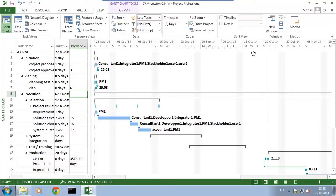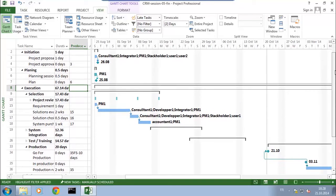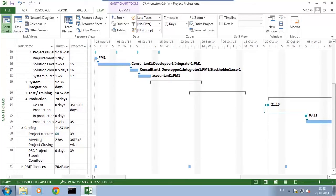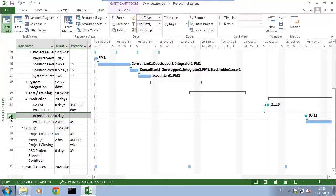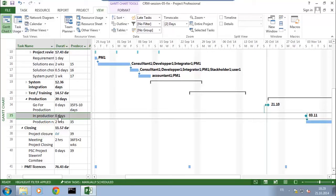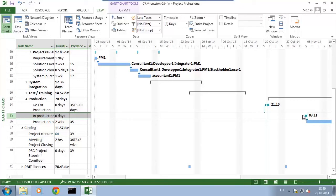I'll jump down in this project. It's an IT project by which we'll install certain elements, and at one point I'll put the system in production. I already have a task called 'in production.' It's not a real task because it lasts zero days, so you'll understand that I've shaped a milestone here. By giving zero days to a defined date which corresponds to when we want to take the system into production, it shows the diamond symbolizing a milestone. Here it is the 3rd of November by which we must be in production.